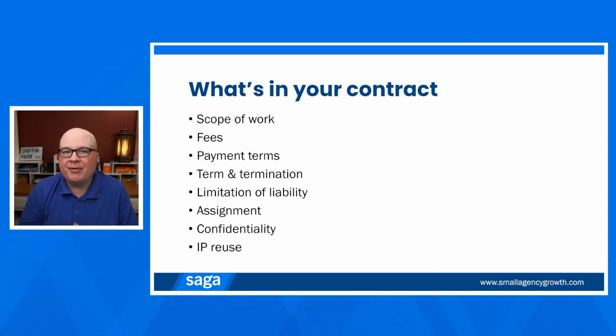And so you should specify in your agreement what you want. I would suggest very strongly that if you're doing retainer work, the fee should be due on the first day of the month during which you will provide those services. So if it's for service in May, you should have that payment by May 1st. At the very latest, it should be 30 days after the end of the month. Anything more than that, and you need to really understand why you're taking on that additional risk of those longer payment terms.